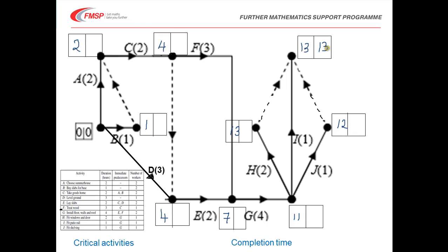So we'll start by putting 13 in there, and the reverse pass, or the backward pass, is all about arcs going out. So there's 1 arc going out there which has duration 0. So the latest possible time that this could finish is 13. Similarly here, this is 13, and this is going to be 13. We've got 3 arcs coming out, so it's 13 take away 2, or 13 take away 1, or 13 take away 1, but it's always the smallest, so this is